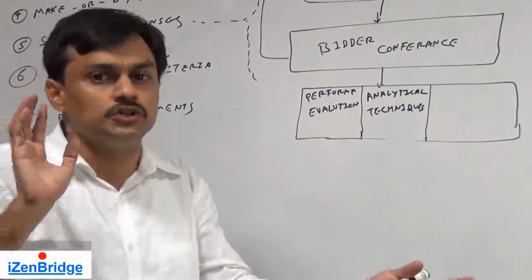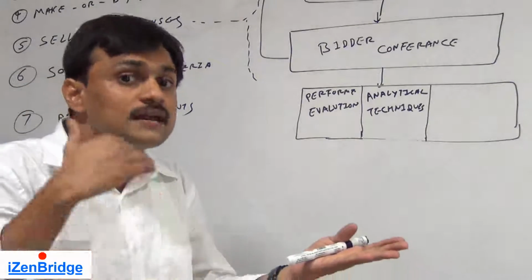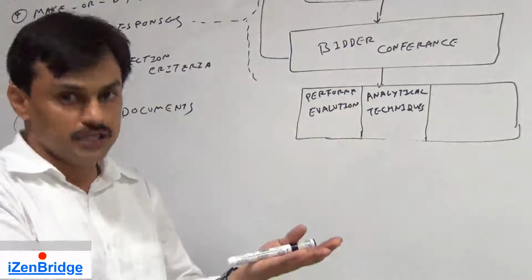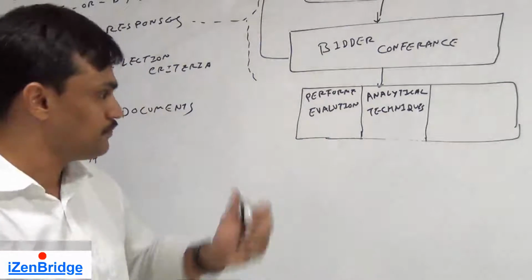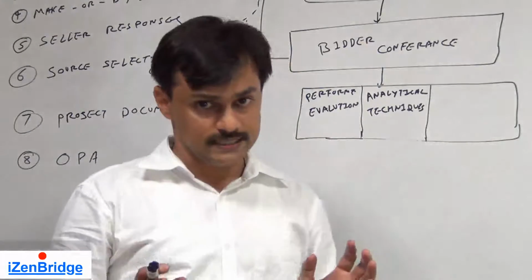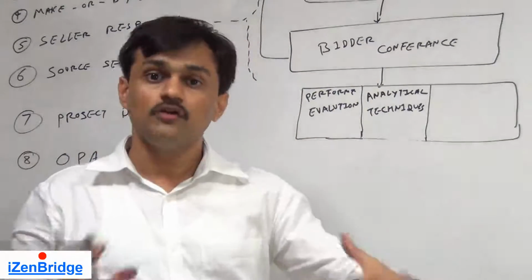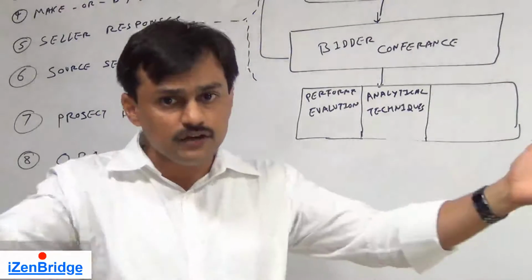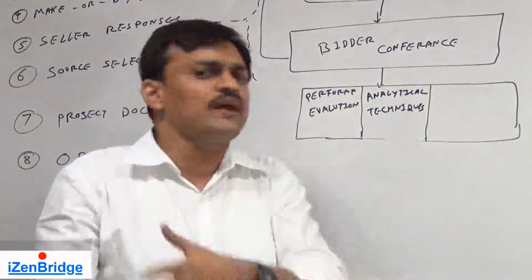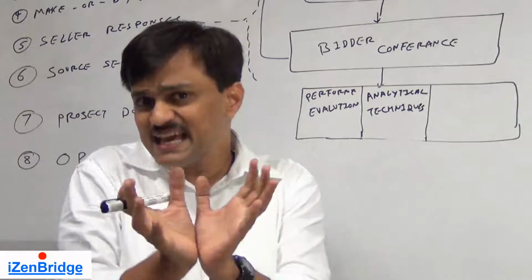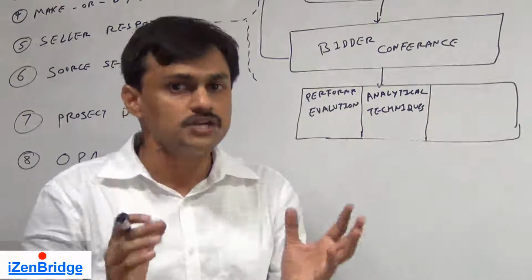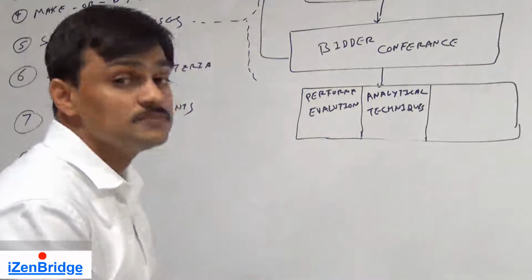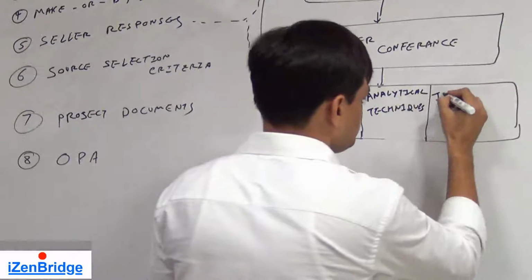Even if the vendor is good, but he is unable to give us the right clarification or right cost for the given work, he may go down in the performance evaluation. For some statements of work, we may go for an independent estimate. If we find that different vendors are quoting very different prices, or the area is new to the organization, the organization may take an independent estimate, and that becomes another tool and technique.